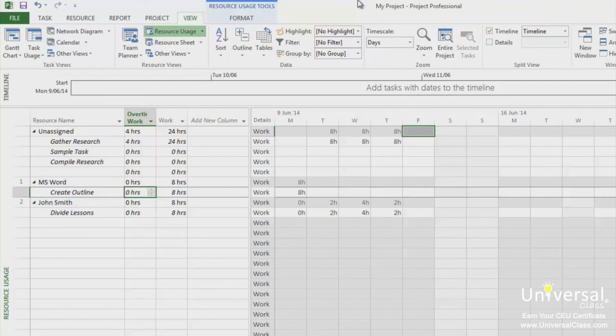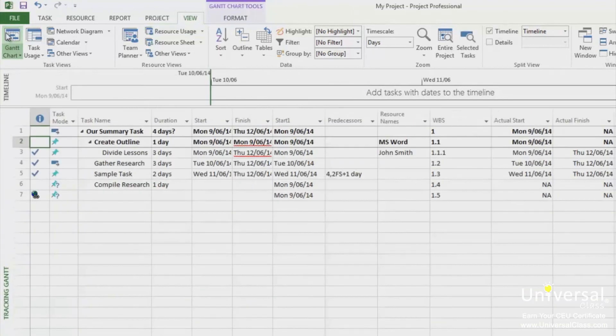If the duration of an auto-scheduled task has changed while it is in progress or already completed, you'll have to enter those changes into Project 2013. To do this, go to the Gantt Chart view. Go to the View tab and under the Tables section, select Tracking.